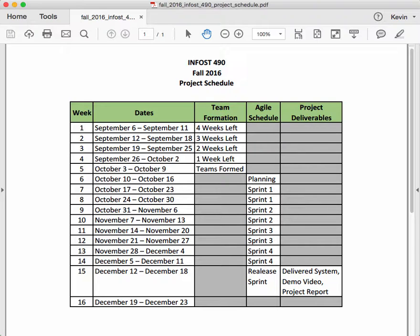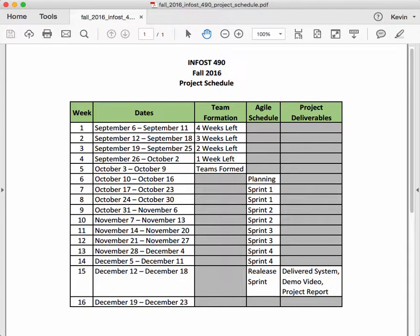The delivered system is the embodiment of all the things that you deliver to the client. The demo video is a demo video. The project report is a written report that you guys are going to have to do that includes the documentation from the agile process and some insights on the learning that went on during the project. And those are all due at the very end of week 15.